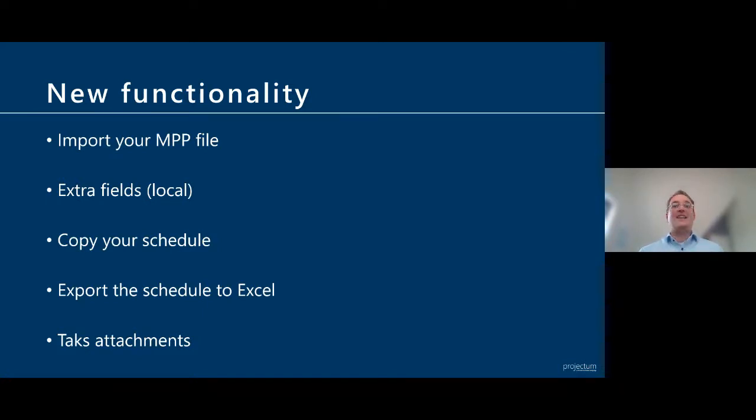Project for the Web, as I see it personally, is a lightweight application, used for a quick way to visualize your schedule or project lifecycle if it is not too complex. So if you need advanced resource scheduling, or a clear view on the critical path, or if you need to monitor cost values, within Project for the Web you will be limited.